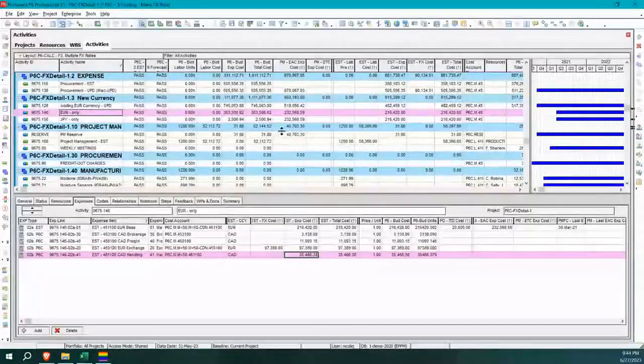Now this does it automatically, and as I mentioned, the key thing here is it's going to know the dates that these hook onto. And if these dates move around, the requirement for the European euros is going to change, okay, when you need them and how much. So that's a big, big factor here.